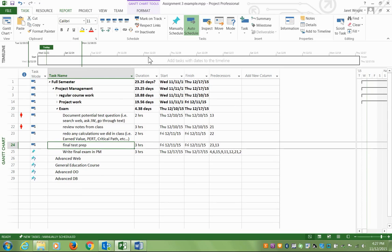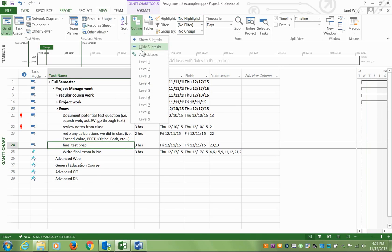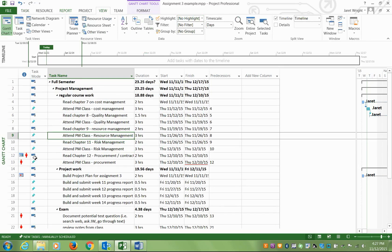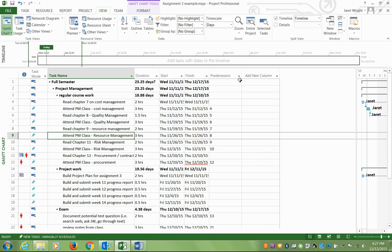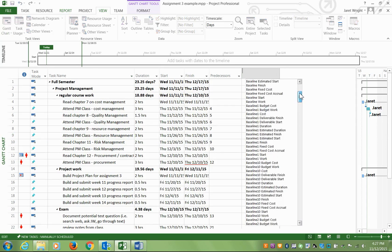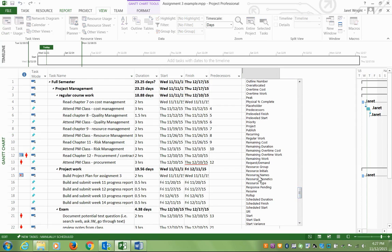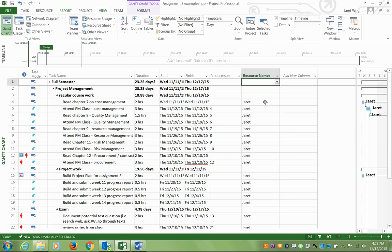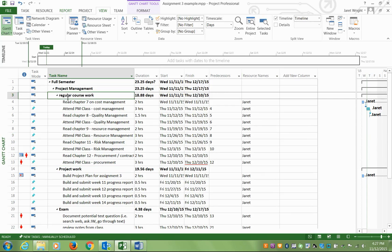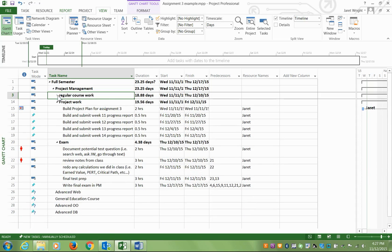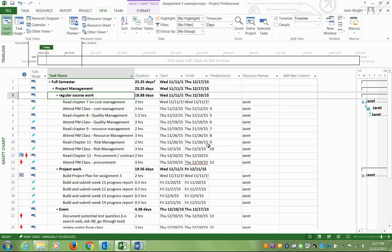If I expand everything, I can see some of these tasks have these little red characters on them. What that means is, if I go over here to resources, resource names, I've assigned myself to the tasks. This is key when you're working on a Microsoft project. Assign people to tasks, never to summary tasks. Anything bold that I can do that with is a summary task. You should never put names or predecessors at this level. It will not calculate things like cost and availability correctly if you do that.